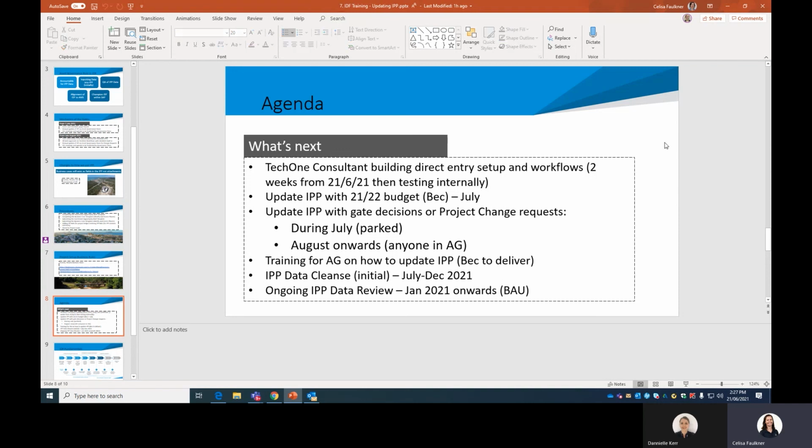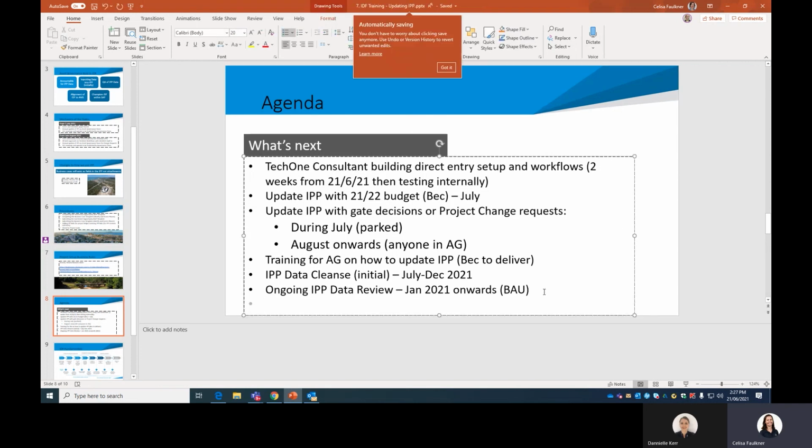For example, water mains and footpaths: if you do the path one year, and then you're going to rip it all up two years later because you want to do the water main, it makes sense to be doing it at the same time. So there are efficiencies that can be gained, and I'm wondering if you wouldn't mind noting on that slide to maybe discuss with Brodie the GIS update.